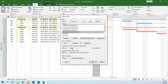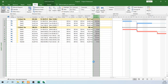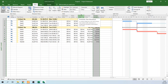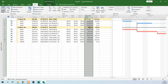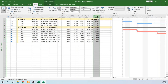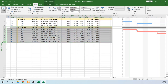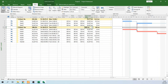Do the same thing for standard deviation: Custom Fields, Rollup and Sum, click OK. As you can see, we entered optimistic time, most likely time, and pessimistic time. MS Project calculated the expected time and standard deviation. We grouped the tasks to get the critical ones, summed those values, and now we have the expected time and standard deviation for this project.